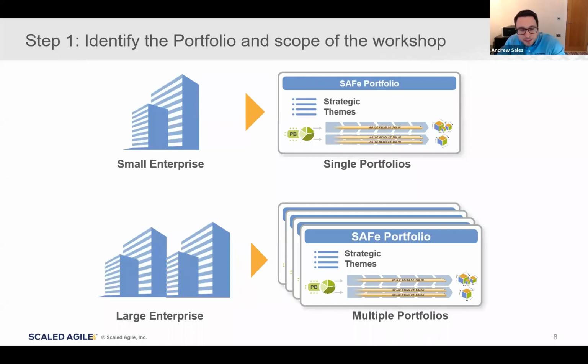And although the value stream identification workshop can address value streams across multiple portfolios, it can really help to ensure the right level of focus and the correct attendees to limit each workshop to a single portfolio at a time. And therefore, to create the right expectations for scoping the workshop, make sure that when you start the workshop, you put a few slides together, just confirming the different business units within the enterprise and the particular business unit that you'll be considering in the workshop that you're starting.